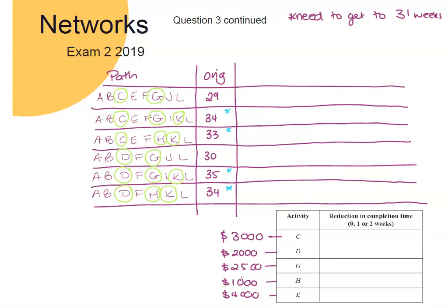And so if I just look for a moment at my current critical path, the activities there, D, G, K, definitely will have an immediate impact. But instead of just reducing that in the combination that will give me 4 weeks reduction in the cheapest way, I'm just going to do each of those activities reduced by 1 for now and just see what impact that has on those other paths. And then I can adjust and make the best decision about what else I need to reduce.